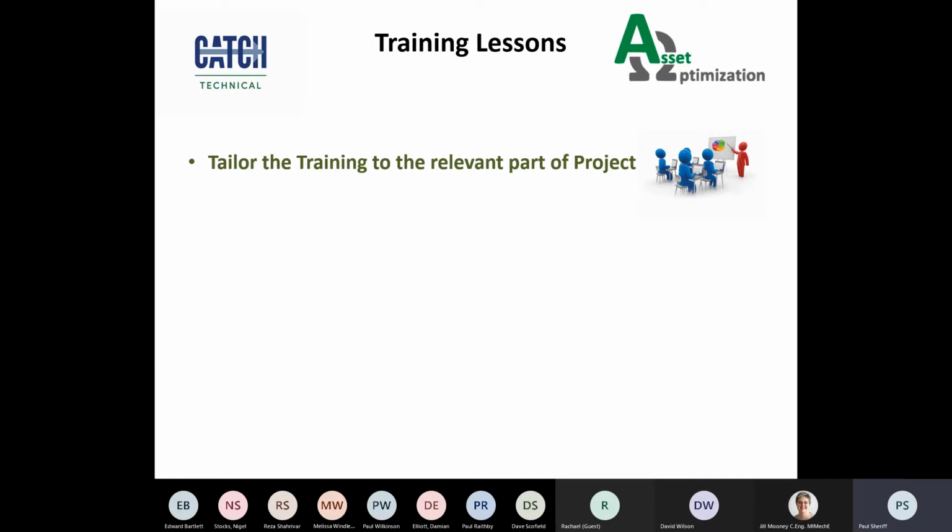Our own company objective is to ensure that the RBI implementation project is a success by being flexible with the project plan and the training plan. And it will only be a success if the client company are able to continue the process once we've left the client's site. It's important that any training given is accompanied with a reference manual, and it's followed up with a chance for the student to use his or her skills to build up the muscle memory required to complete the tasks, either whilst the consultant is still on site to advise and coach, or available through Teams, for instance.